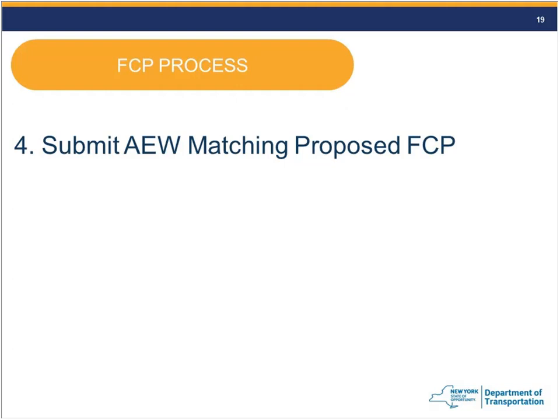Couple other questions. We've always been told that we can use the same AEW for multiple FCPs. That is true. AEWs are not change order specific. You can break that up however you want. Personally, I don't do that. That's my own decision. I like to serialize my AEWs, but if you don't, so be it. I find it's easier for me that way, and everybody works a little differently. So if that works for you, so be it.